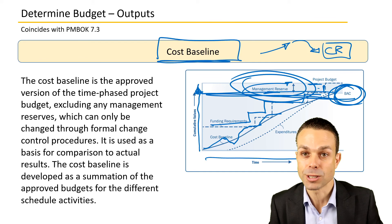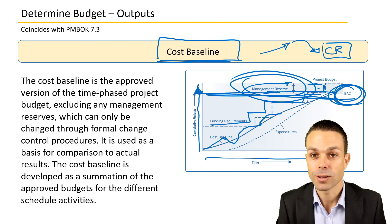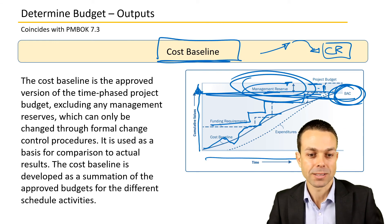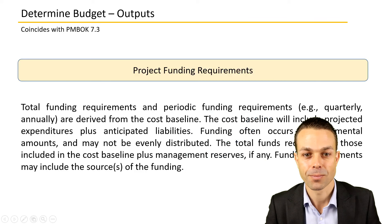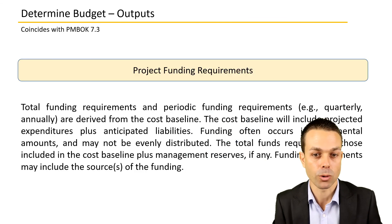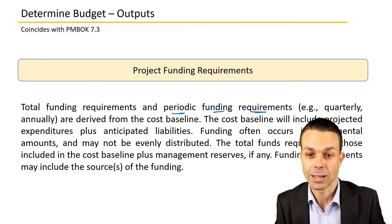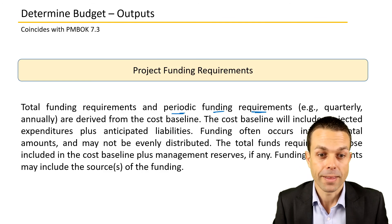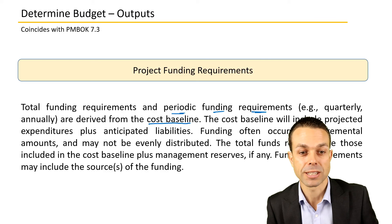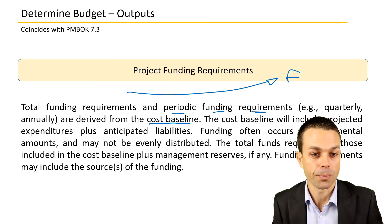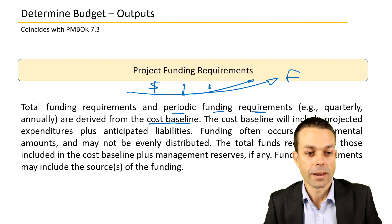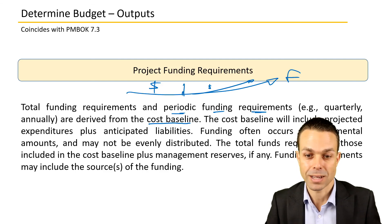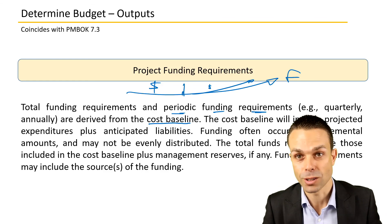The cost baseline can only be changed through formal change control procedures, and it's used as a basis for comparison to actual results as they happen. It is developed as a summation of all the approved budgets for all the different scheduled activities. Project funding requirements may be periodic — quarterly, annually, or monthly — and are derived from the cost baseline. The cost baseline includes projected expenditures, which may not be evenly distributed, plus the management reserves. Funding requirements may also include the sources of the funding.